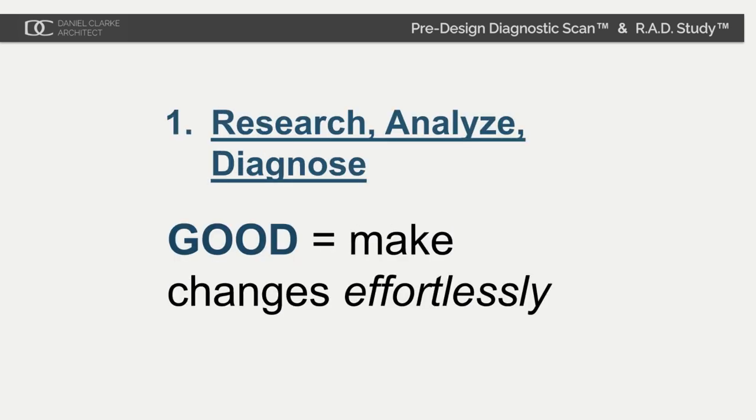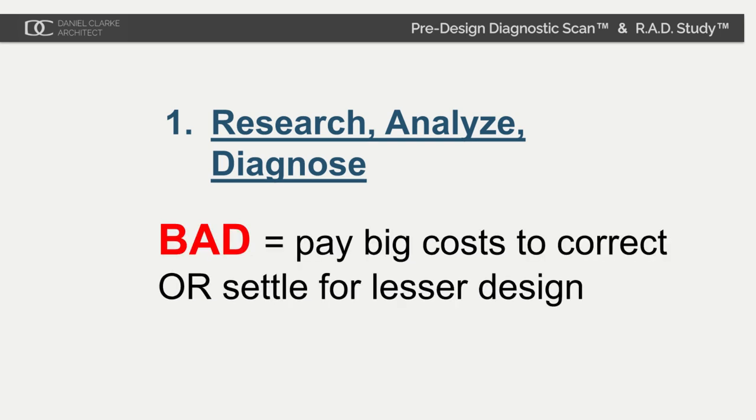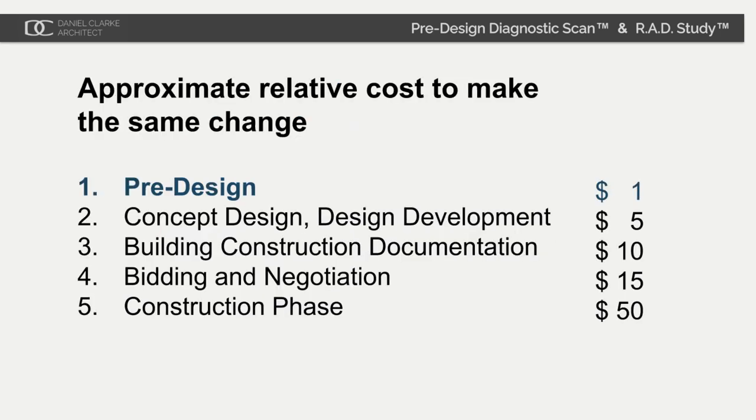If you discover better options early, you can make the changes effortlessly. Make your discoveries late and you pay exponentially more — or worse, you live in a house where you settled for a lesser option. Here's an indication of how costs change the later you make changes: at the pre-design diagnostic scan stage it might cost you a dollar to make a change.